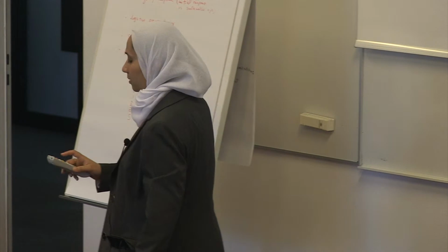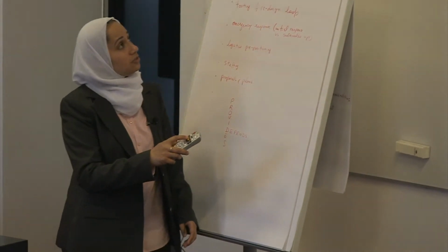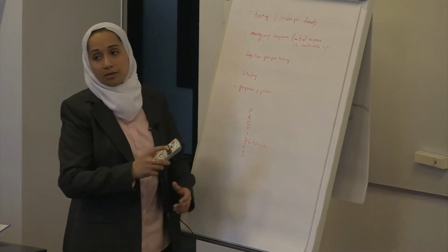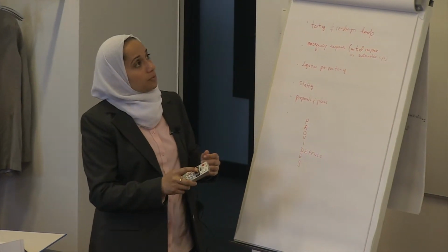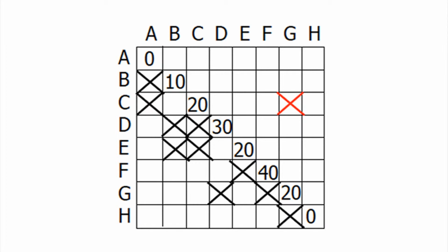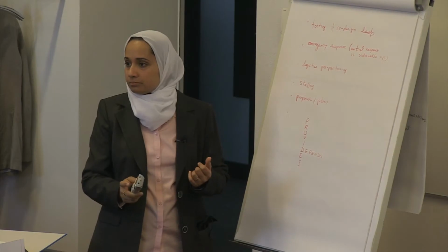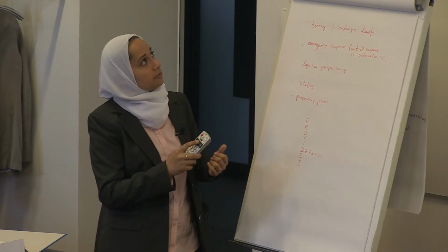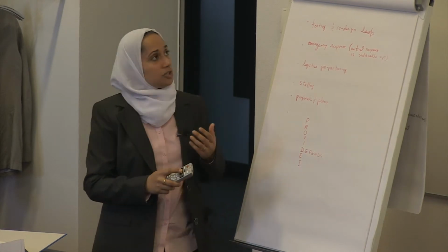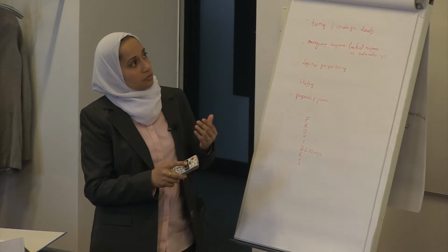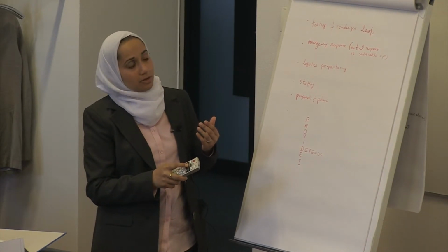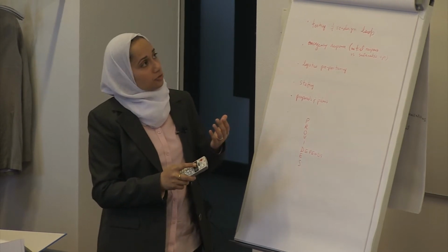So let's say now we wanted to introduce a cycle, and we said that once we get to task G, we go back to task C, for example. What we would do in the matrix is put an X here, right? So G provides to C, okay? Because G is feeding an arrow into C. So C depends on G as well. So if you look across the row for C, C depends on G, in addition to, of course, depending on A as well, right?